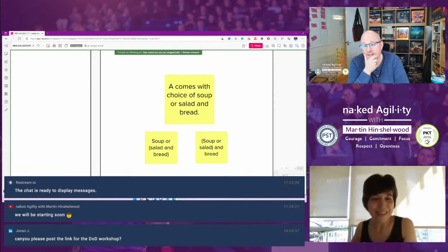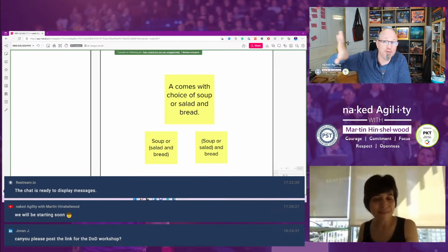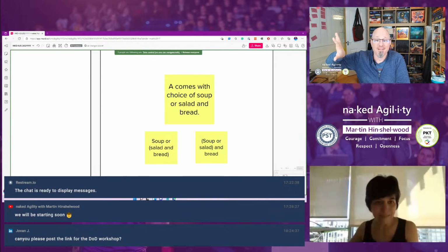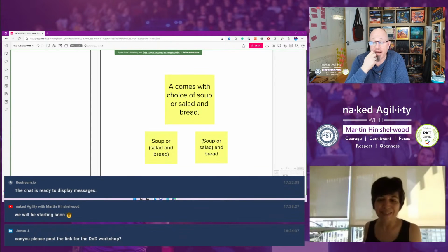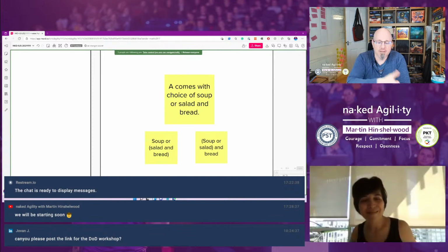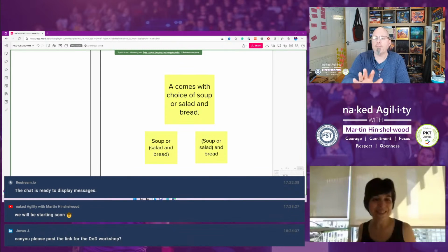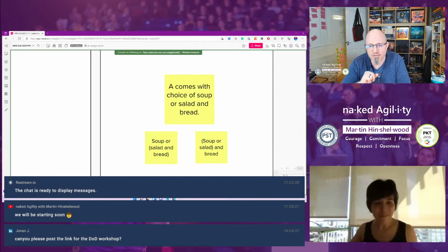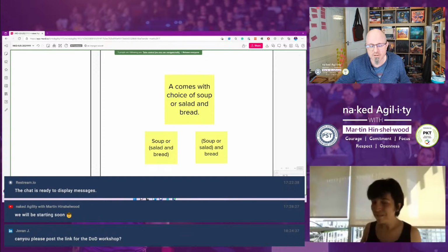Yeah, absolutely. And that for me is where conversations around definition of done come in, right? So we have a conversation around what's the minimum level of quality we need, and one of the questions on that is testing. How much functional testing do we need? This much. What about performance testing? Oh, okay, every page must respond within 500 milliseconds. Okay, now we have a performance metric. How many users do we have to support?